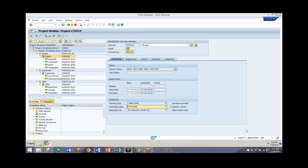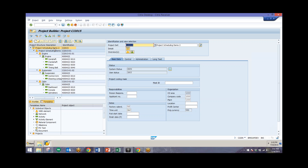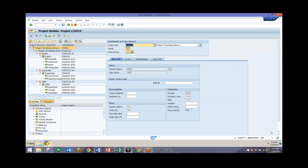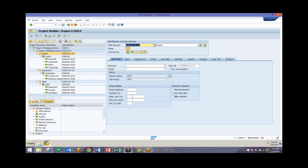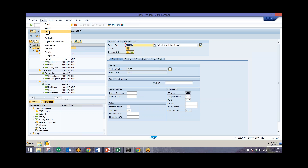There are two different ways to schedule from Project Builder. One way is from the main screen. When scheduling the entire project, make sure you click on the project definition at the top before you schedule — otherwise you may only schedule one particular activity or network while leaving others unscheduled. To schedule from this screen, go to Edit. Before we schedule, our basic start and end dates for this engine network begin on the 9th of July and end on the 22nd. We'll go through and schedule and see those dates change.